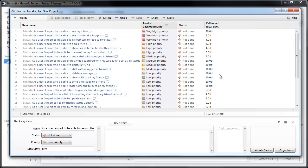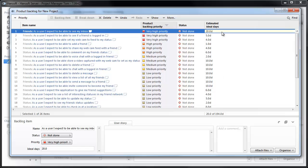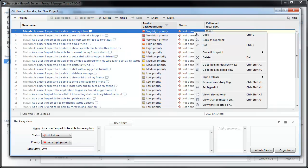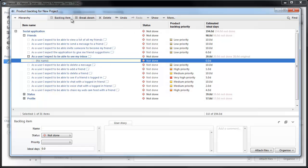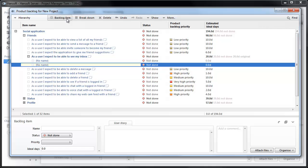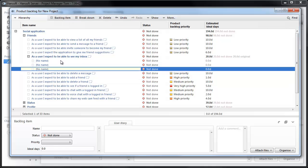We have a problem here though. We have a very big item here on top and we're probably not going to be able to handle this in the first sprint. So we want to break this down. When I right-click it and choose to go to item in hierarchy view, I will highlight that in hierarchy view and allow me to break it down. So I'm going to break this down into three user stories.